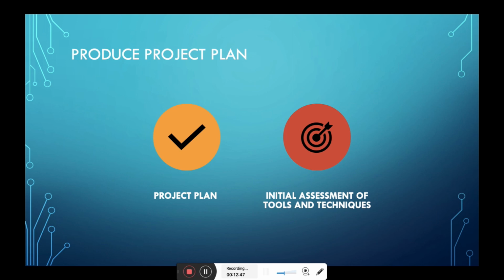So in the project plan, we have to list the stages to be executed in the project together with the duration, resources, required inputs, outputs, and any dependencies. Wherever possible, we have to try and make explicit the large-scale iterations in the data mining process. And at the end of each phase, we have to review the progress and achievements, and we have to update the project plan accordingly. So specific review points for this update should be a part of the project plan.